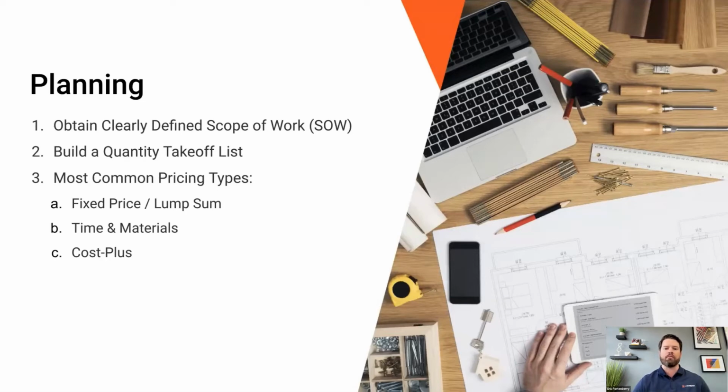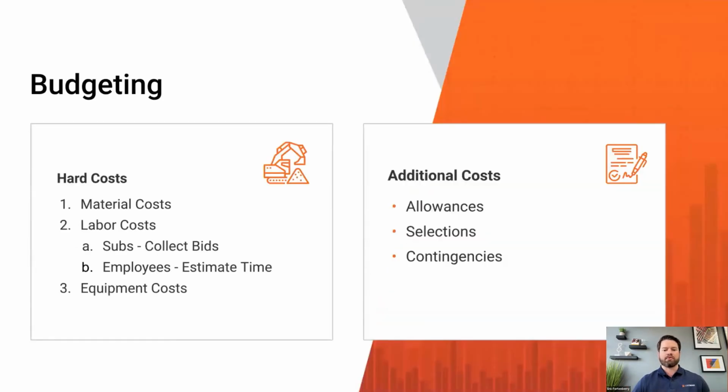A lot of the time, home builders take their costs, and then they've got their fee, which is a percentage of that, as part of the job as well. So when we're thinking about budgeting, again, it's very important to understand what your hard costs are. You've got material costs, which, again, I highly recommend you get real-time pricing from your suppliers.